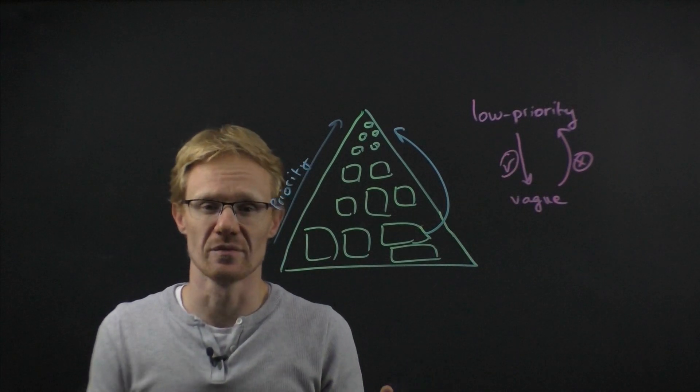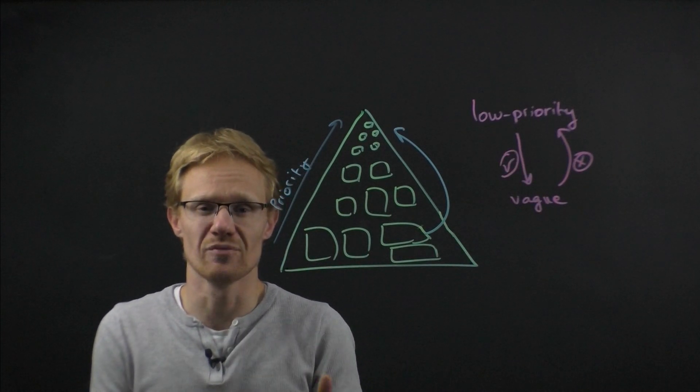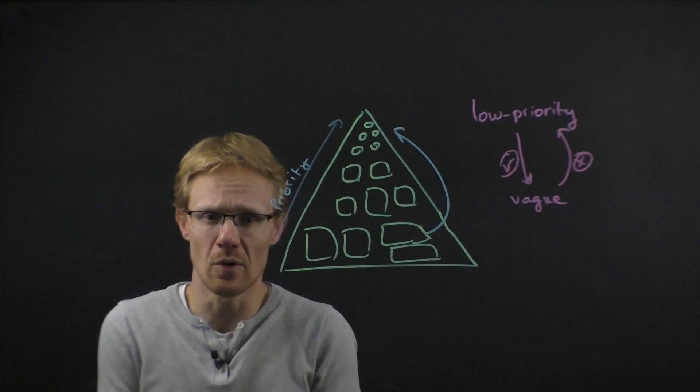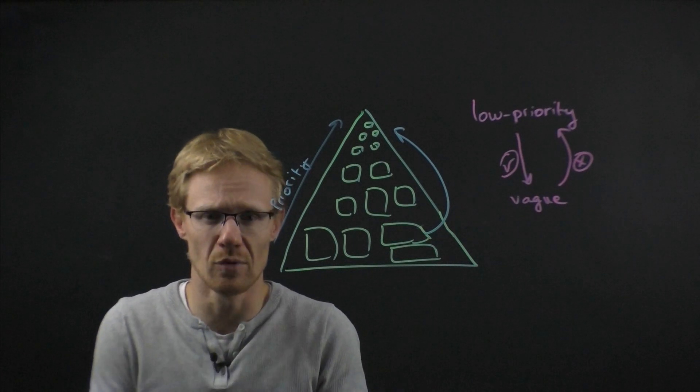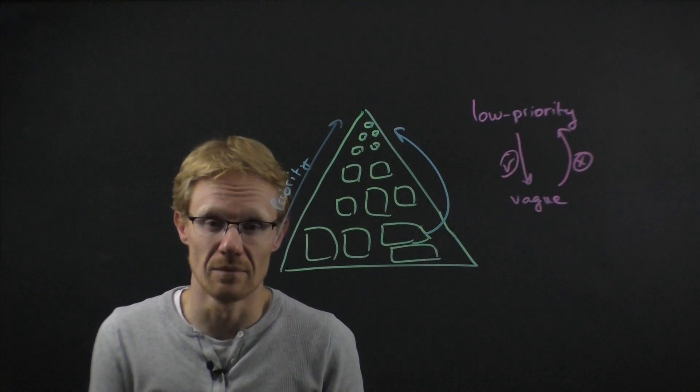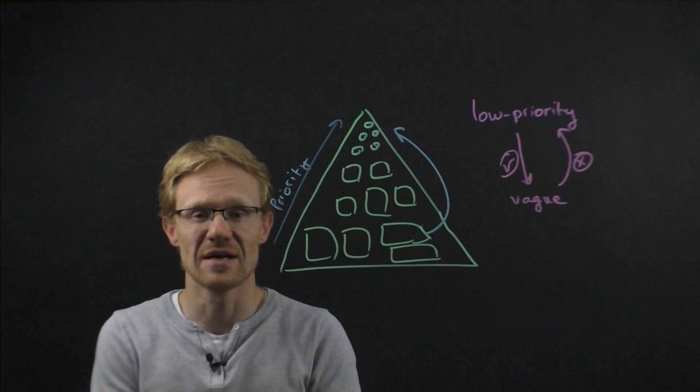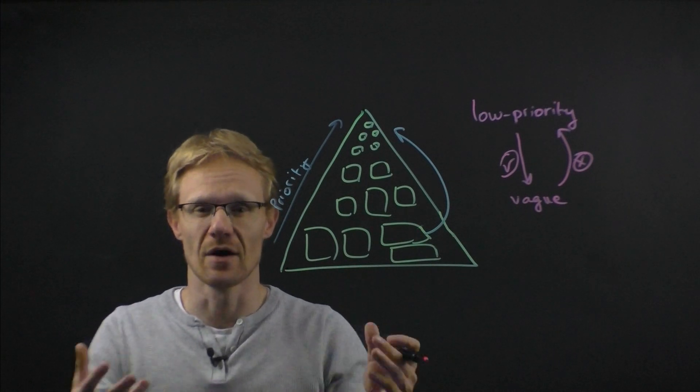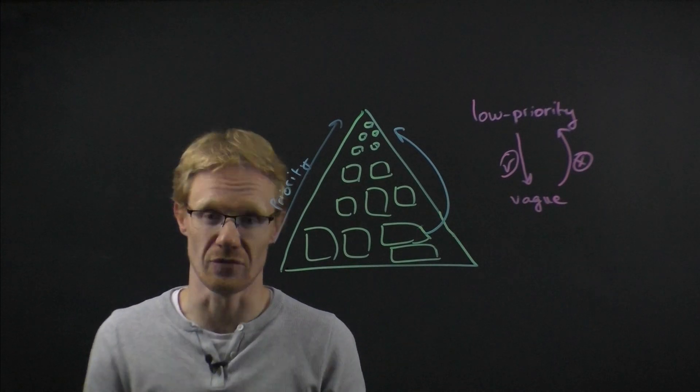And by pushing back on those items, they become essentially de-prioritized. Is that really what we want? If this is something really important and innovative? If these are low priority, they are of course not going to be worked on for some time. And crucially, they are not going to magically become better understood over time, especially if you don't work on them.